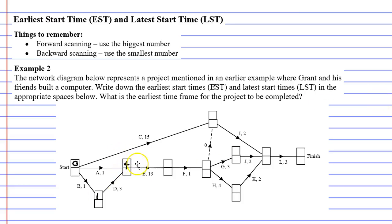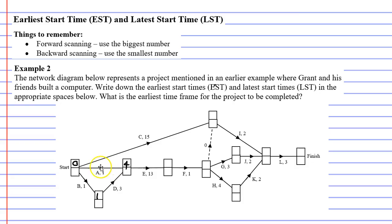So why do we pick the bigger number? Grant and his friends are building this computer, so one friend could complete activity A while another completes activities B and D. Activity E cannot start until all preceding activities are complete. So even though one friend might finish in one minute, activity E still has to wait on the other friend who takes four minutes. So we put the larger time in.